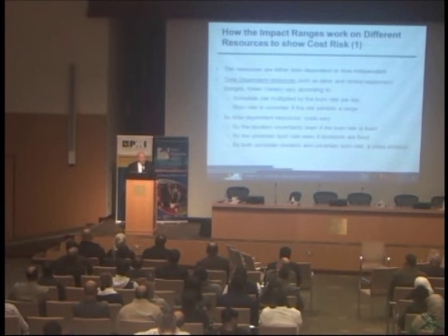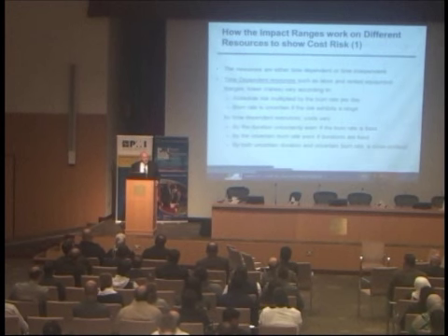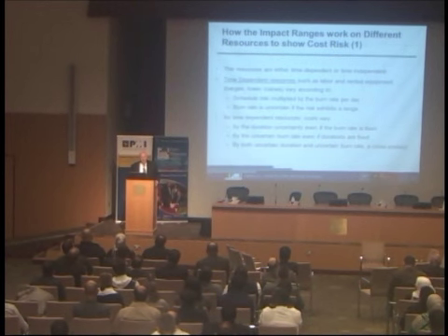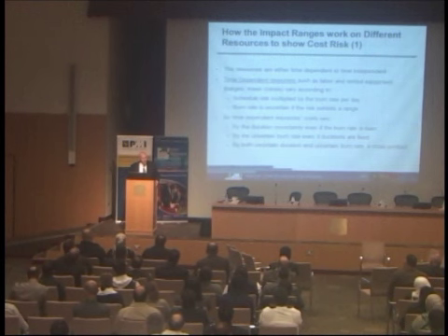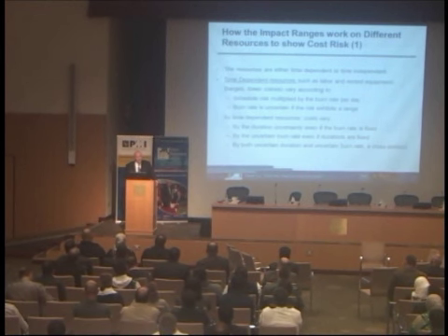Okay, load at a summary level. Create hammocks and load some resources at the hammock level if you've got costs estimated at phase level or something like that. That'll work just fine. The more you can put the resources on the activities, the better you can estimate your risk-adjusted cash flow accurately by month. But at the same time, you don't really need to put them on the most detailed activities.